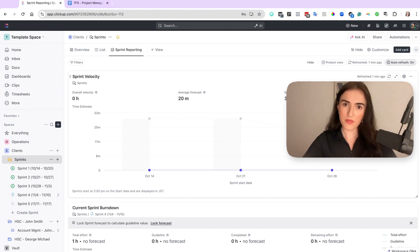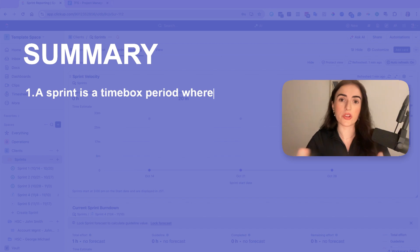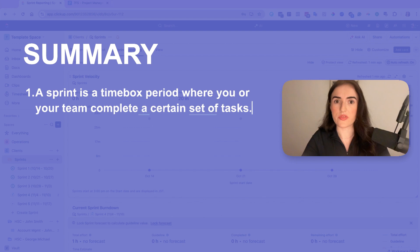So to sum everything up, a sprint is a time box period where you or your team need to complete a certain set of tasks. And usually that should be one week for an agency.